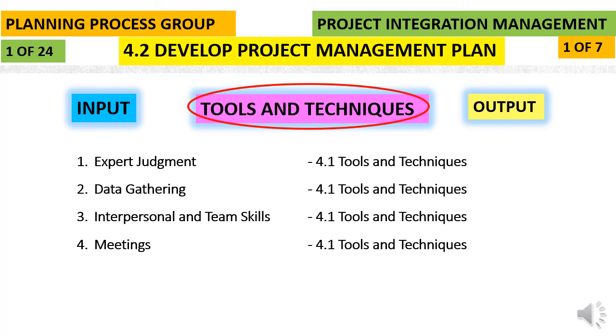For small projects, there will be only one team performing the planning and execution. So in this case, the kickoff occurs immediately after the initiation, in the planning process group. In large projects, the project management team does the majority of the planning, and the balance of the project team is brought on when the initial planning is completed, at the start of the development or implementation.